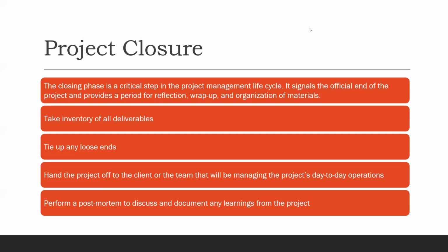How do you hand over such a project? That person works with us, the UN organ, for that period of time that we are handing over. So it could be for a year, that person already worked with us in the office. And we don't just train the person through a workshop. The training is hands-on as the person works with us until such time the person does the work already. And then perform a post-mortem to discuss and document any learnings from the project.